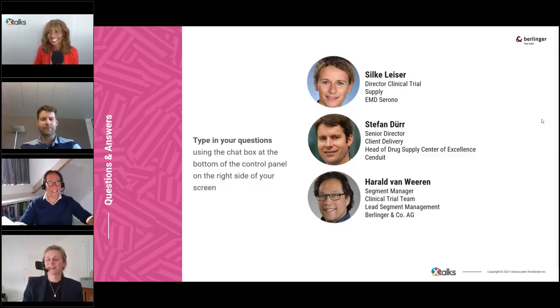I'm not happy to provide clear numbers. It's always tricky with strangers. But I would say, for the core stuff, really the definition of requirement specification and such things, around about 6 to 8 months. But this definitely does not include everything, the first approach to get in contact, to see what the systems can do, what the idea is behind. So this is not included in this time frame.